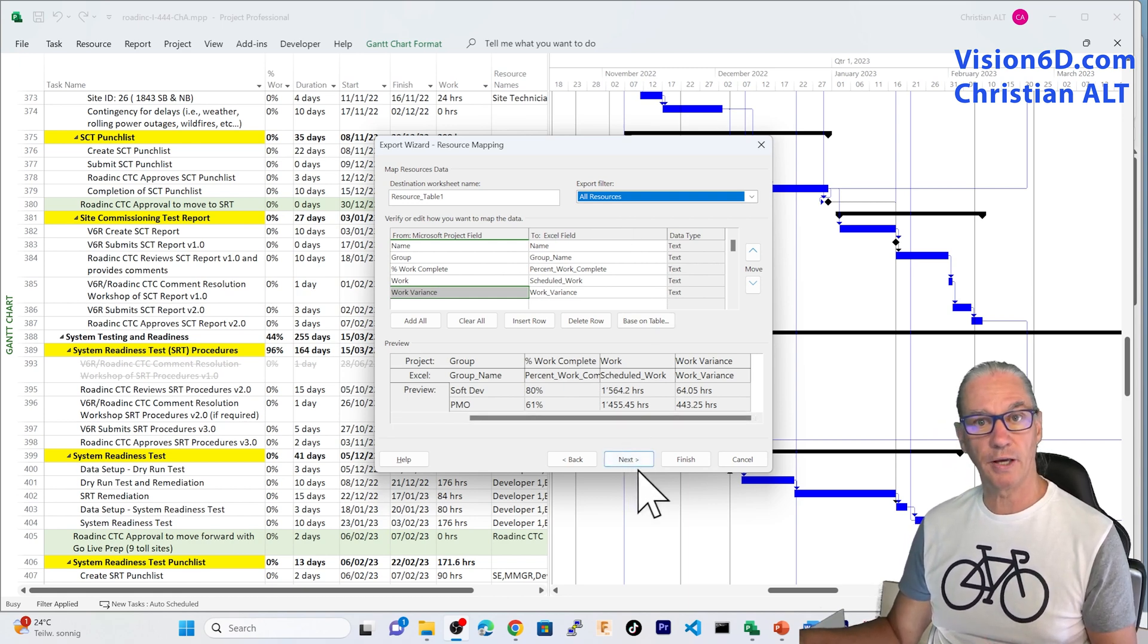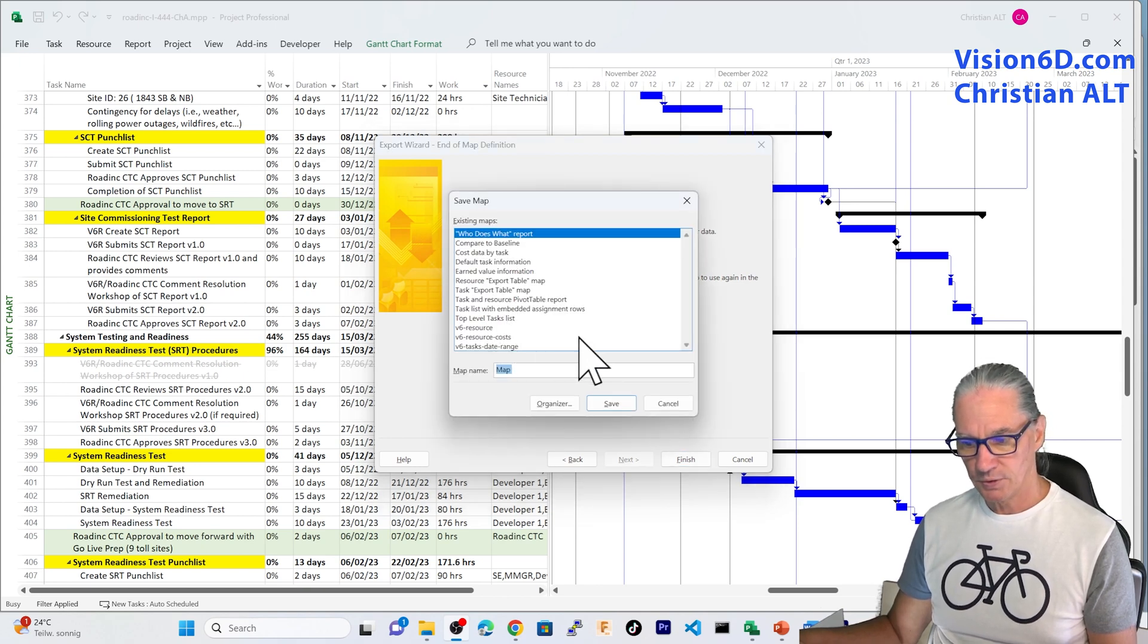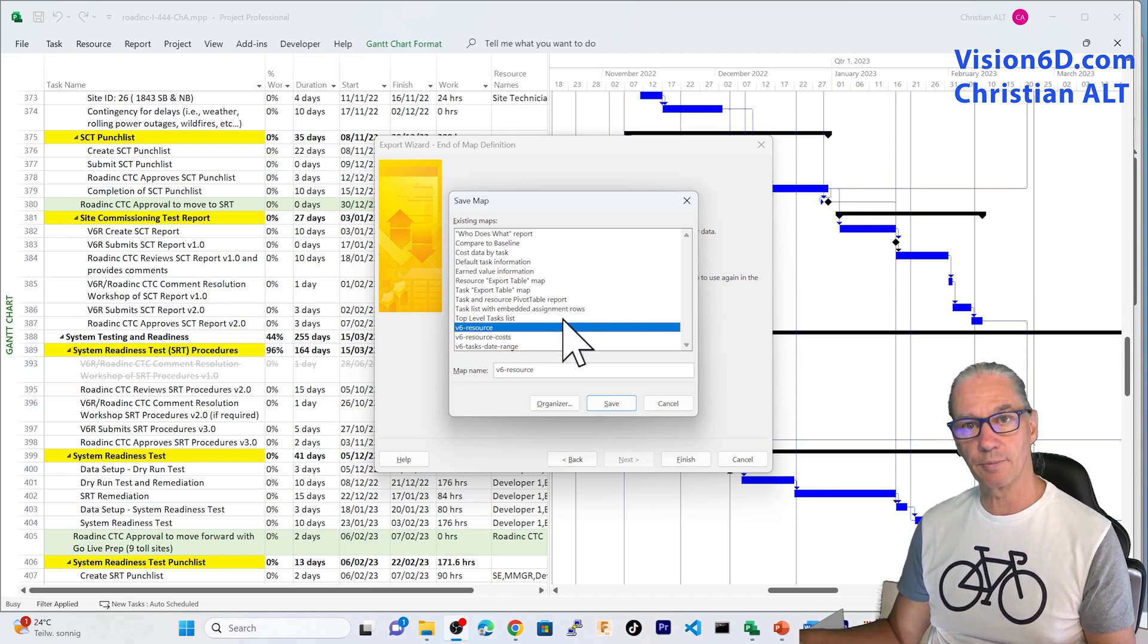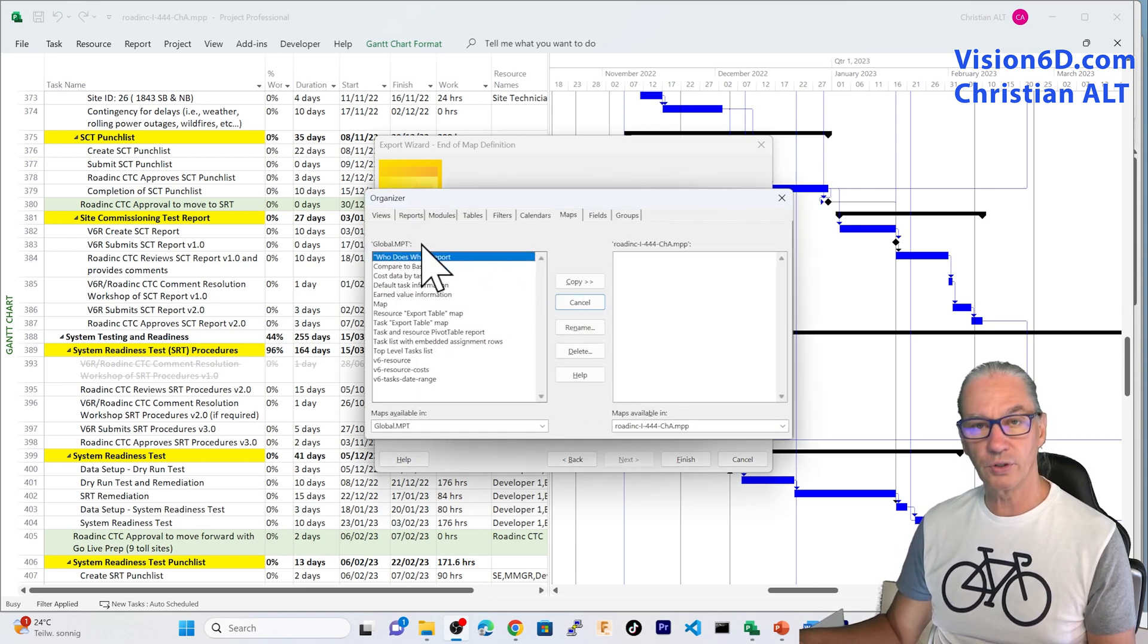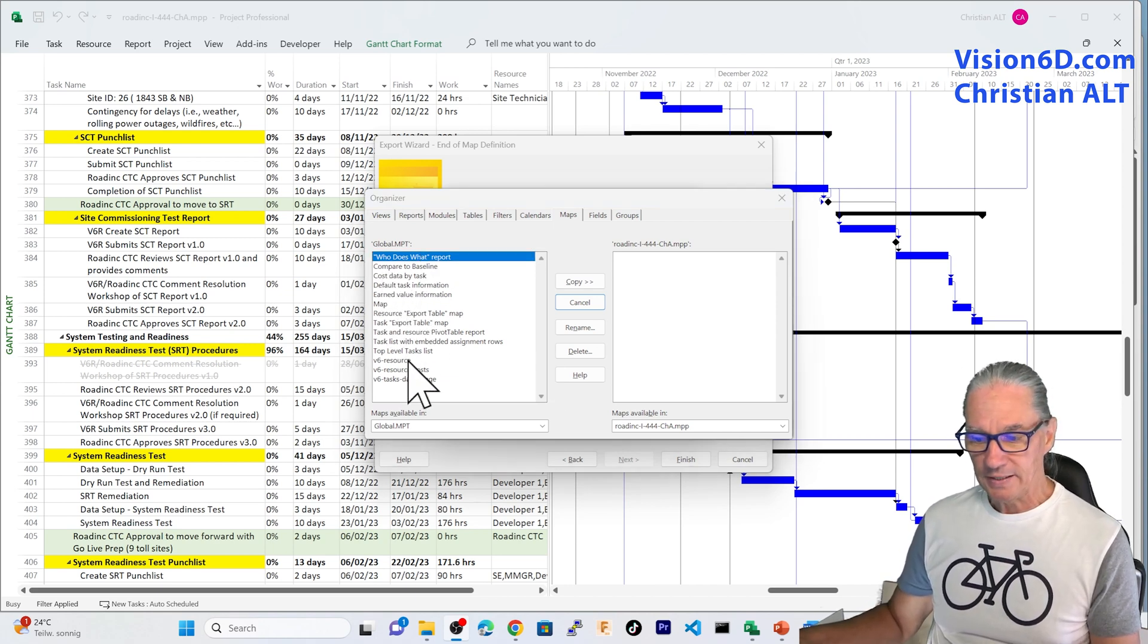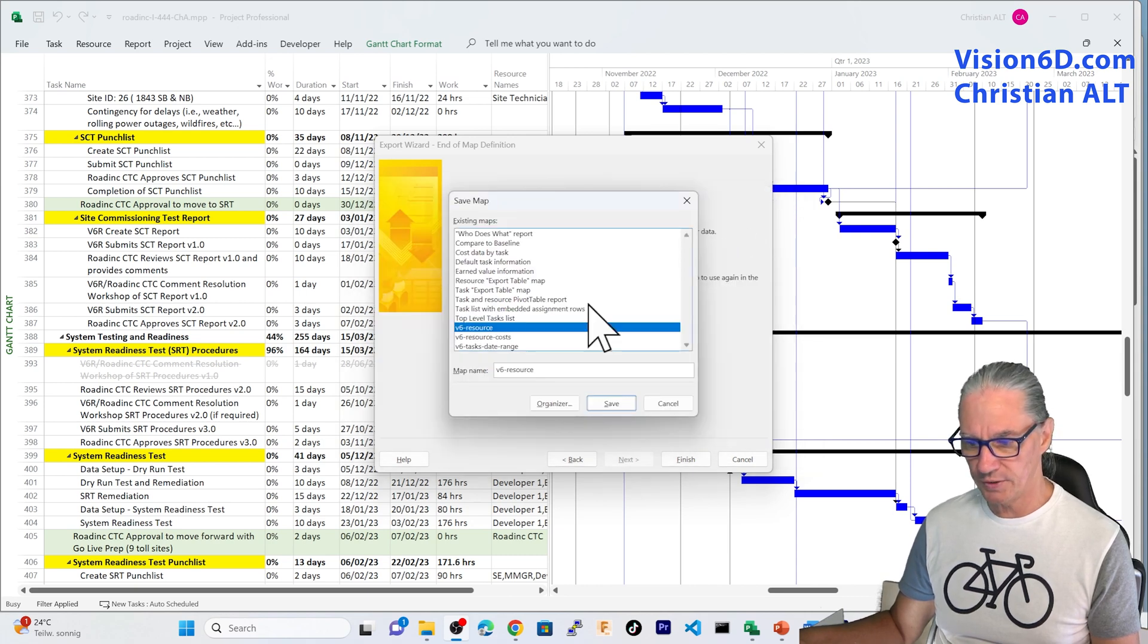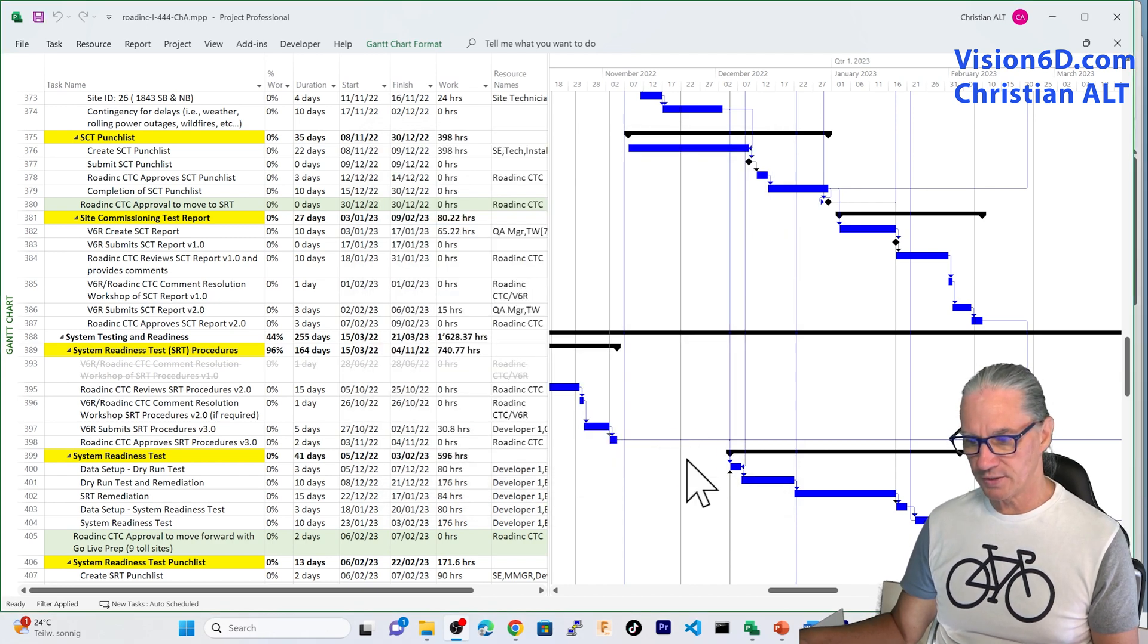So once I've done that, I could say finish and the export would happen. I'm going through the intermediary step, which is here to save that map. So I had already here a map which is called v6-resources. The interest of doing this, it's that you are going to be able to reuse that map in your project. So you don't need to recreate it. Another point that is also interesting here, it's to know that those maps, they are going to be stored in what we call global.mpt. And it means that your map can also be used by other projects. So we are not going to change here anything into this. We saved the map. Since it exists, it says that do I want to rewrite it, which I said yes. And now let's finish.